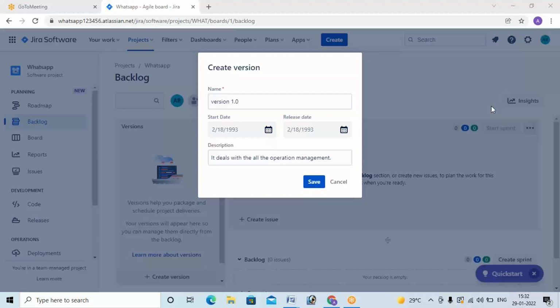Actually, there are two types of demo. After UAT, we give a demo, and at the sprint end, we give a demo. So I'm confused, are both the same or different? First one is UAT. In that, only the client will be present. You are giving the client enough knowledge to check all the requirements by putting in their data, not our data. We ask the client to provide the data, because they need satisfaction that the product is working properly or not.